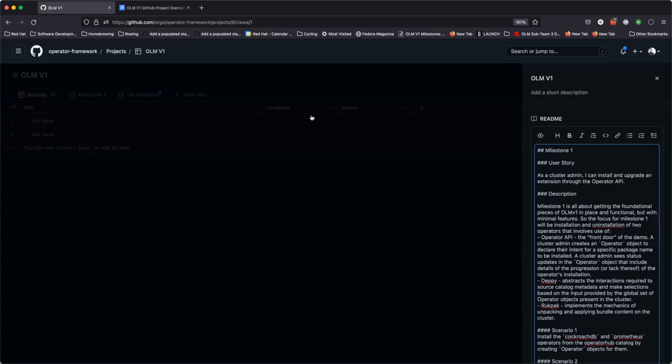Yeah, I agree with that. I think one of the important things that we should also try to do is limit scope, right? Obviously we want to get to the point where we've got the entire V1 requirements done. But the smaller we can scope the incremental work, the easier it'll be to, A, make progress, and B, get that feedback that you're saying that we need, which I totally agree with.